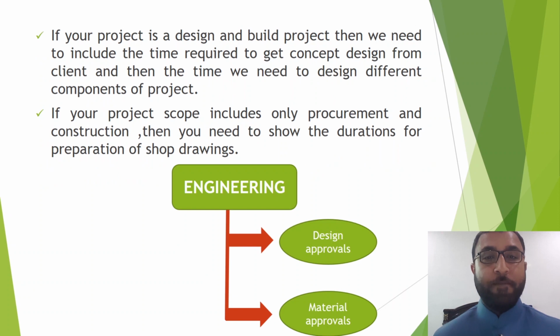Engineering has two major components: design approvals and material approvals. Design approval means the drawings. If the project has already been designed, then you need to prepare the detailed shop drawings. So the submission and approval of the shop drawings you need to include.